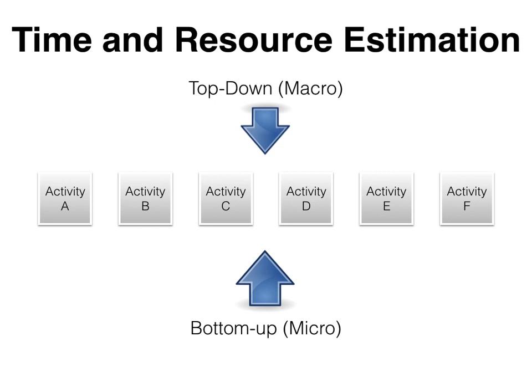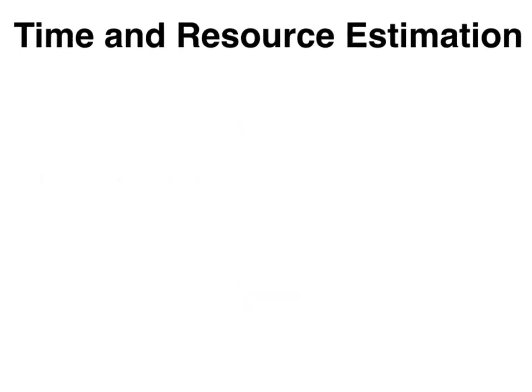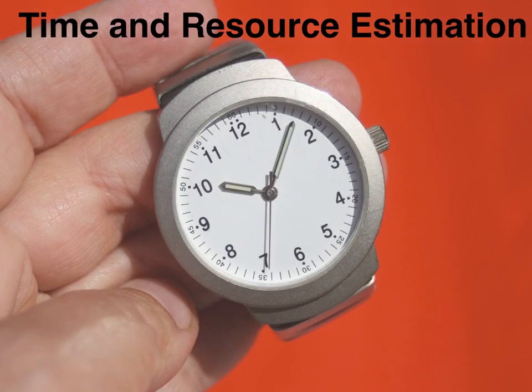There are two basic categories of estimation techniques. Top-down or macro estimates use some sort of analogy, group consensus, or mathematical relationship in order to make a relatively quick, but not as accurate, prediction of our costs and time requirements. Bottom-up or micro estimates are made using the elements from our work breakdown structure, take a little more time to produce, but are much more accurate. So hopefully you understand a little bit about the importance of time and resource estimation for any project.